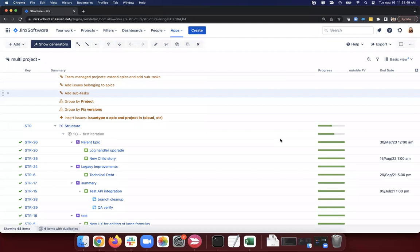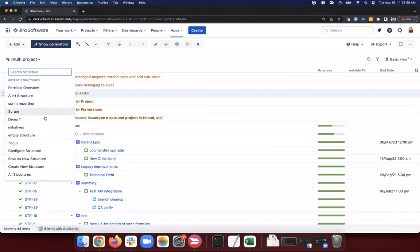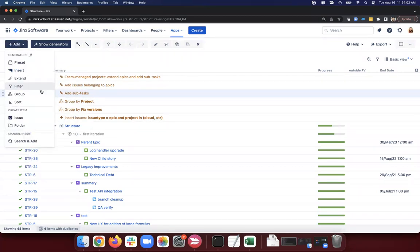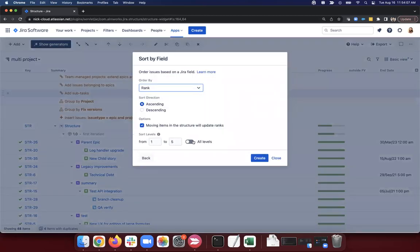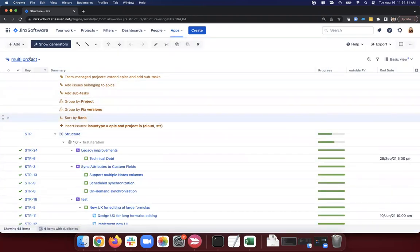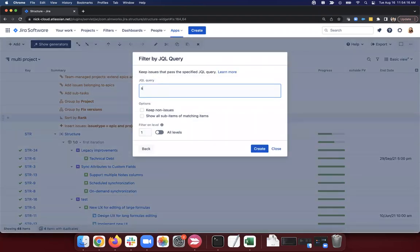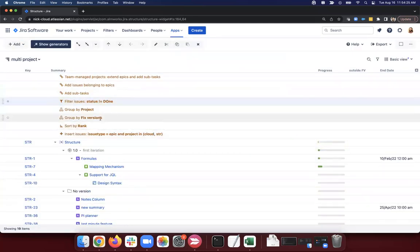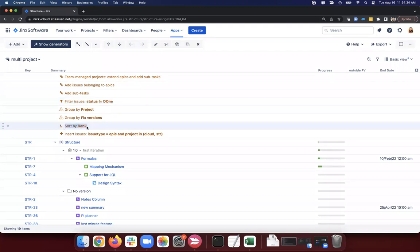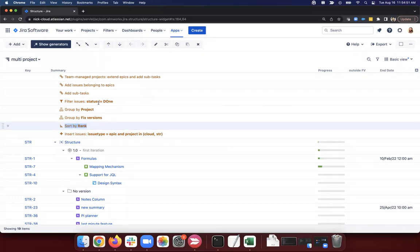Q: Can rank work when we use filters? Yes. Rank will work even with filters — it's not really going to have any effect. We order by rank, and if I add a filter such as not showing done items, we're filtering issues first and then sorting them afterwards. The missing items don't affect the rank. Rank is designed to always have a deterministic sort order — whether there's one item or 10,000 items in the board, rank is not going to have any issue sorting.